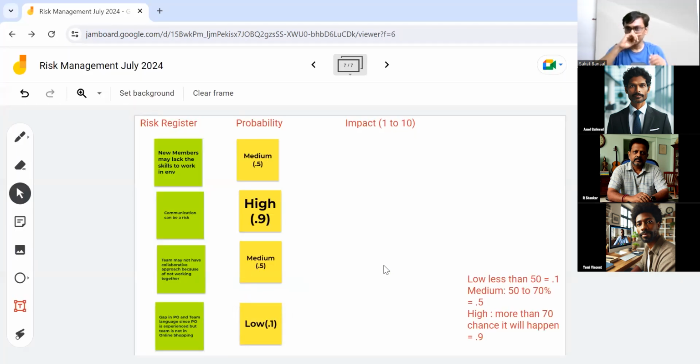So right now, we are making a subjective judgment. We are not looking at a weather forecast to find out the percentage probability of rain tomorrow. That's why it is a qualitative assessment, a subjective assessment. That's the word we use. Most projects focus on that only. Who will do it? I can involve subject matter experts. I'm not necessarily alone as a project manager doing this judgment. I can involve whatever roles are relevant, technical roles, scrum master. We talk and we give this particular rank.